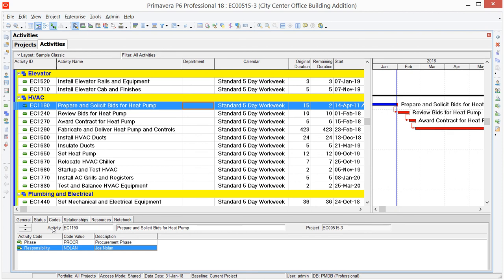To use Fill Down, you simply need to bring in a column that represents the activity code that you're going to be assigning. And here I brought in the Department column into my layout.